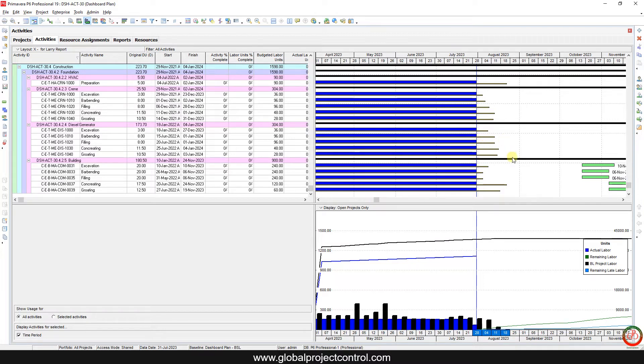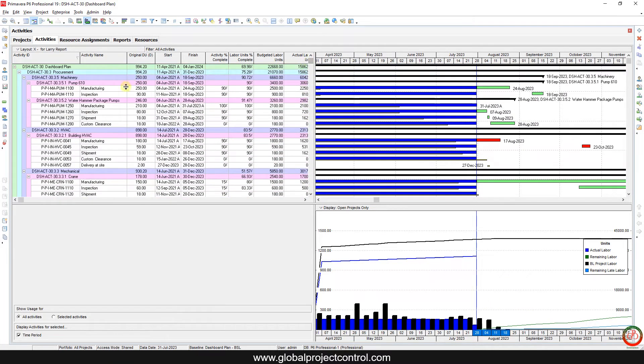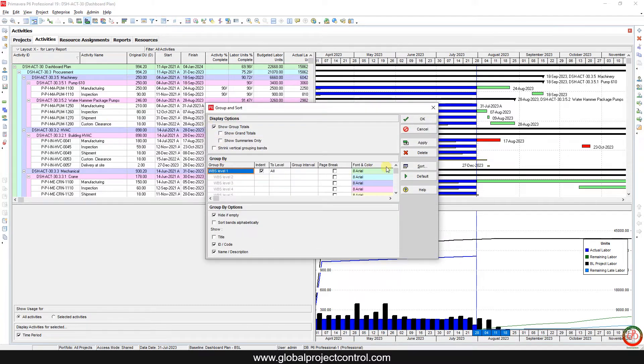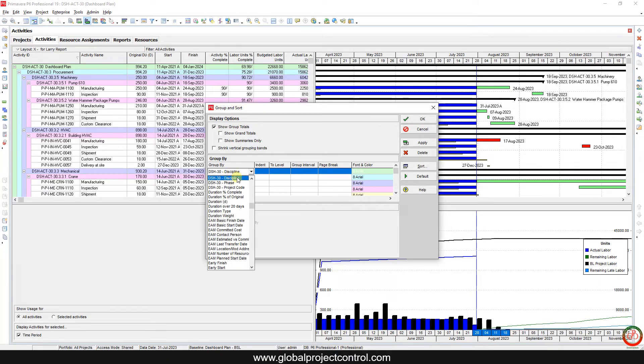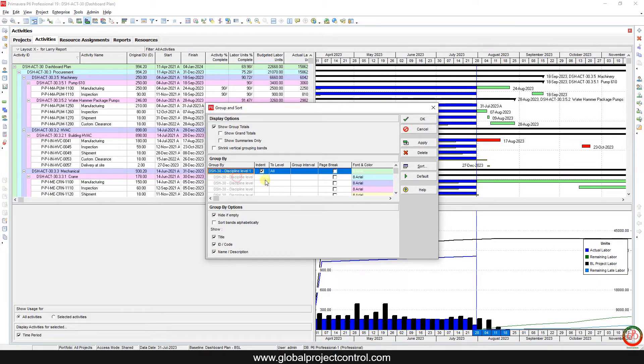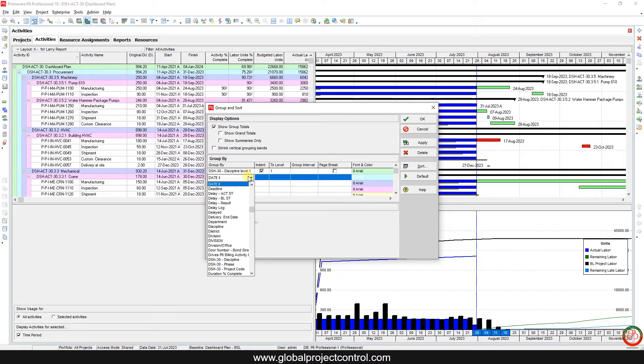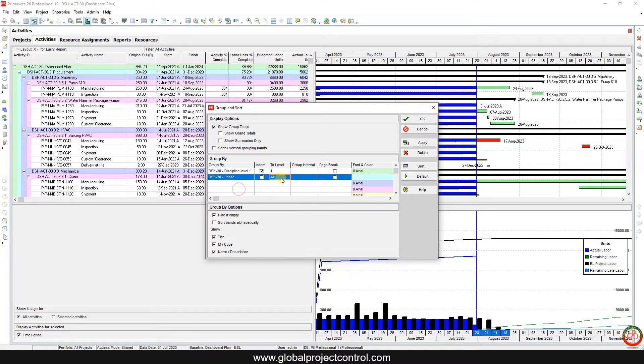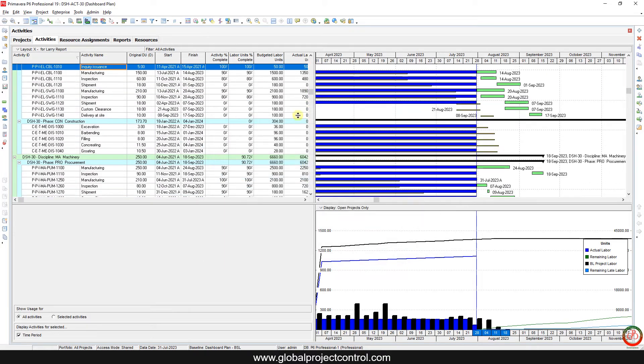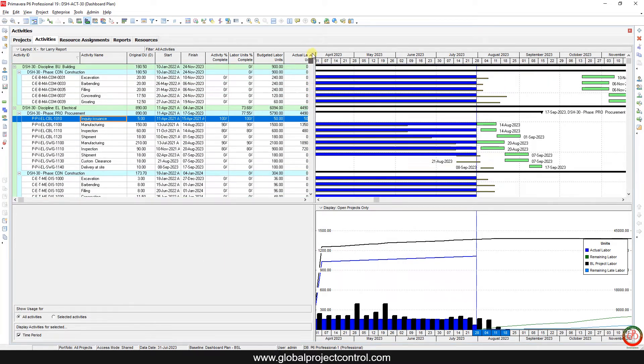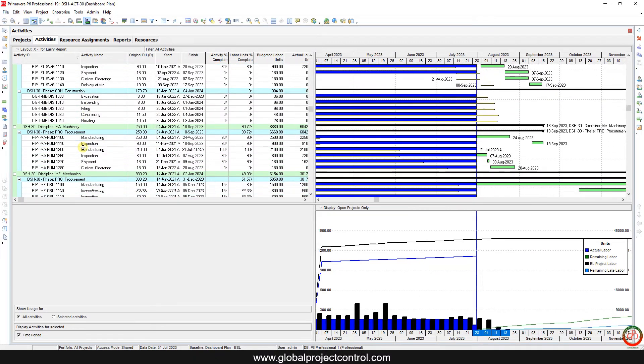Now we adjust the activity, we select the proper timing. Now I want to know which of this activity related to the machinery discipline, so I go to the group and sort, remove the WBS from this section. Now I add the discipline and phase, and apply it. Then as you see, the phase and discipline based on my activity code comes up over here.